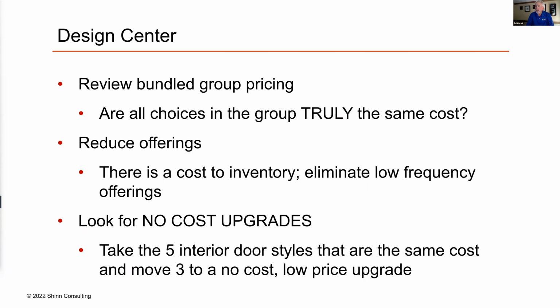Dave, describe blended average for me, please. Yeah, so if I have a base group that has, let's say, 3 cabinet doors and a handful of colors, when I'm doing that bundled base group, my cabinet company is just going to take those different varieties within my cabinet. They're going to theoretically average out the cost.